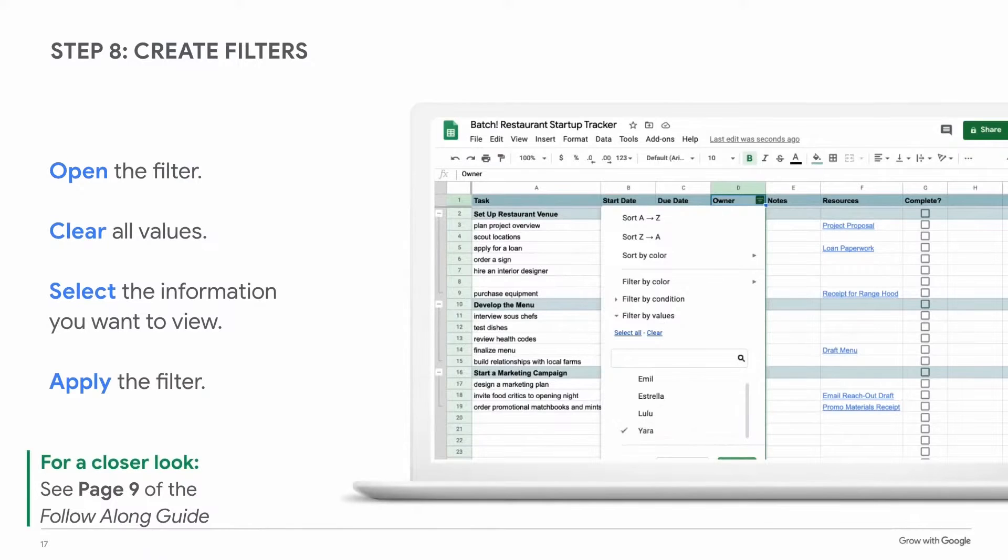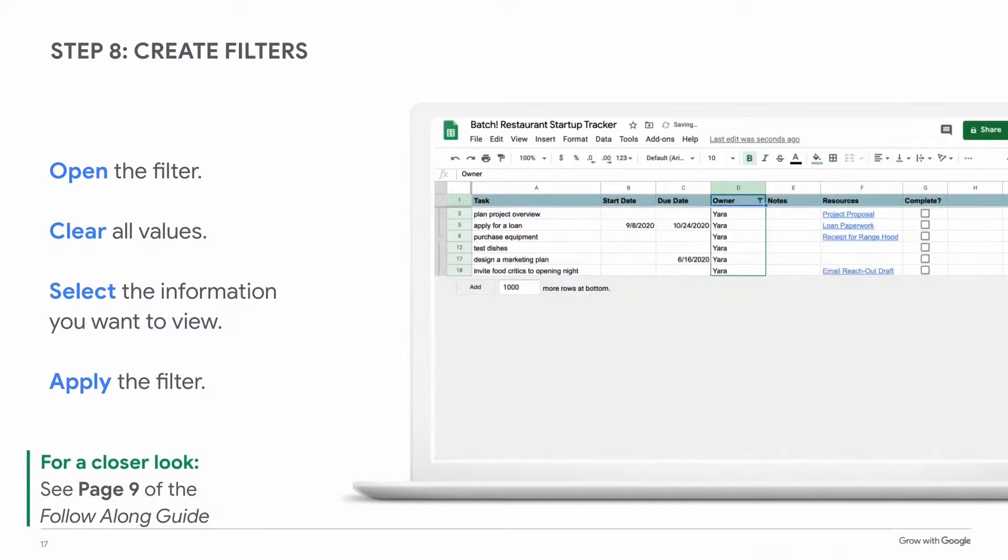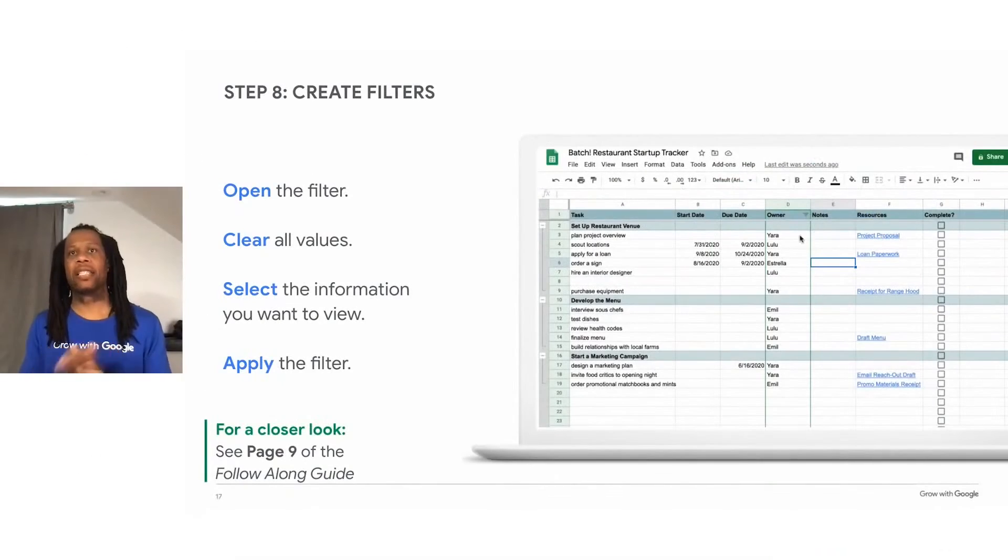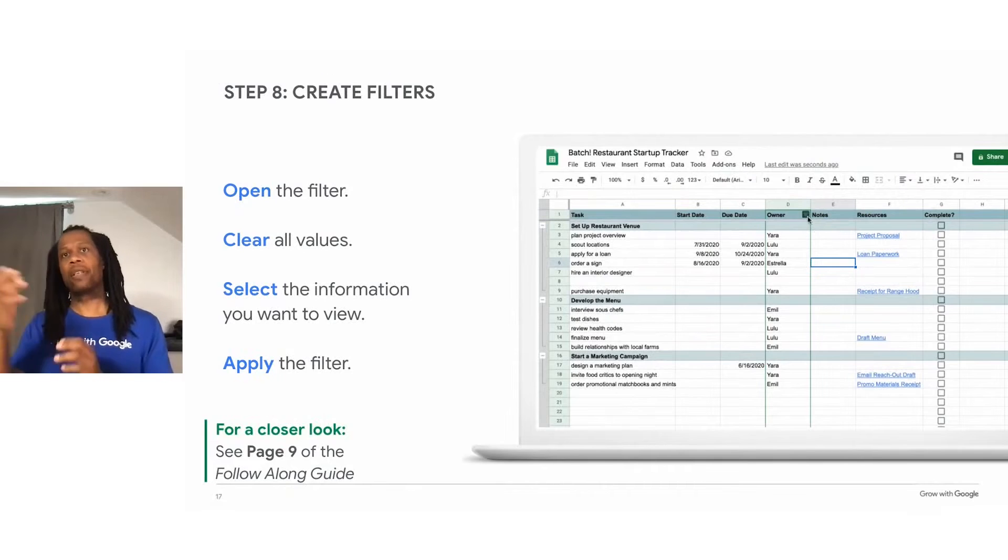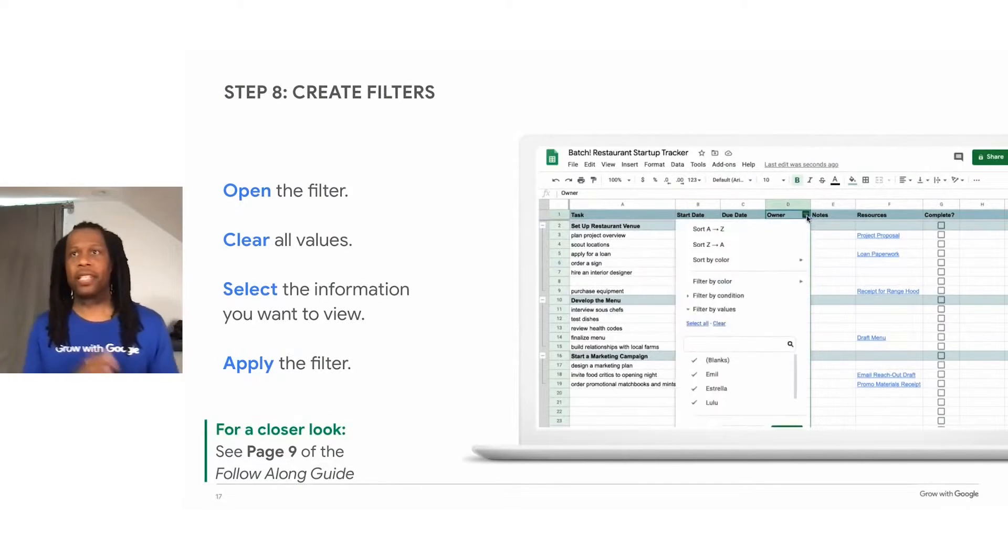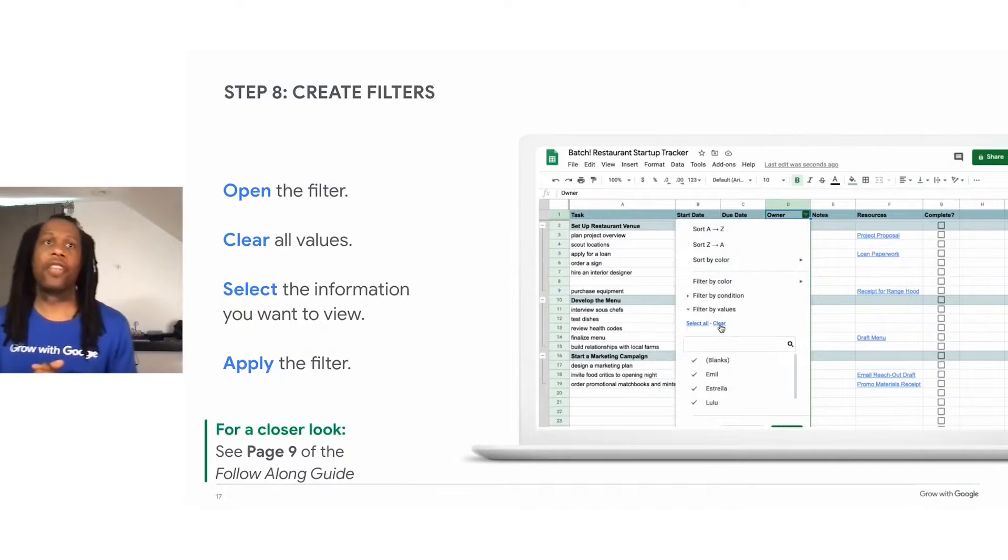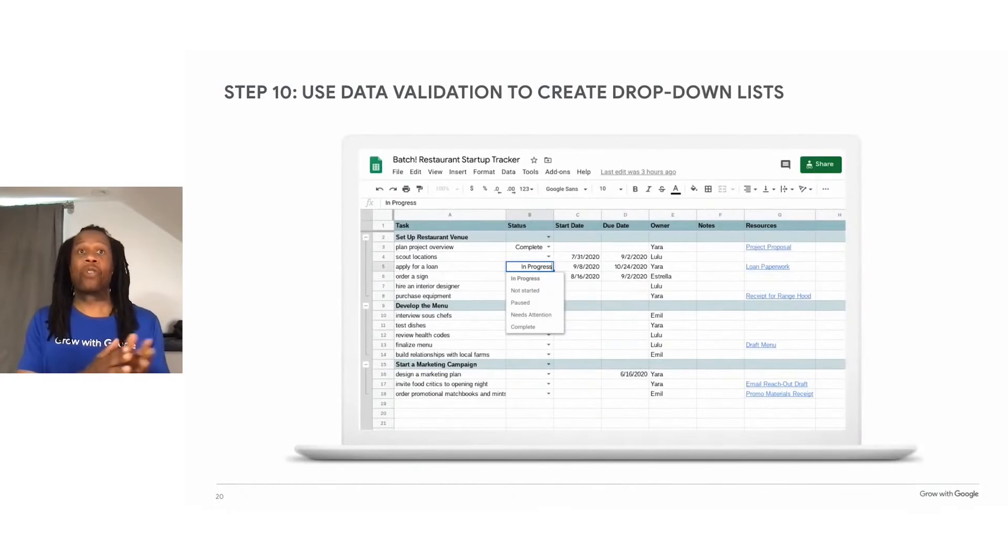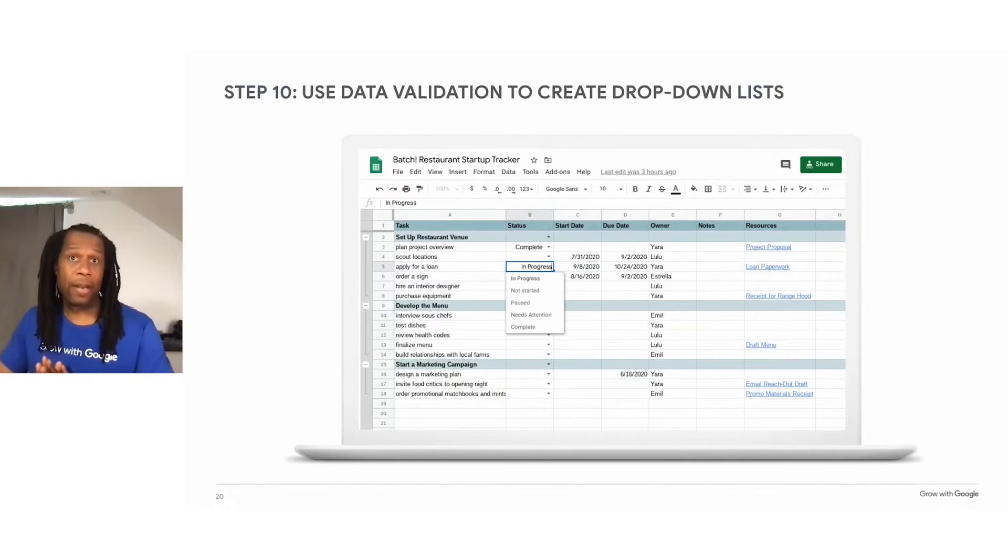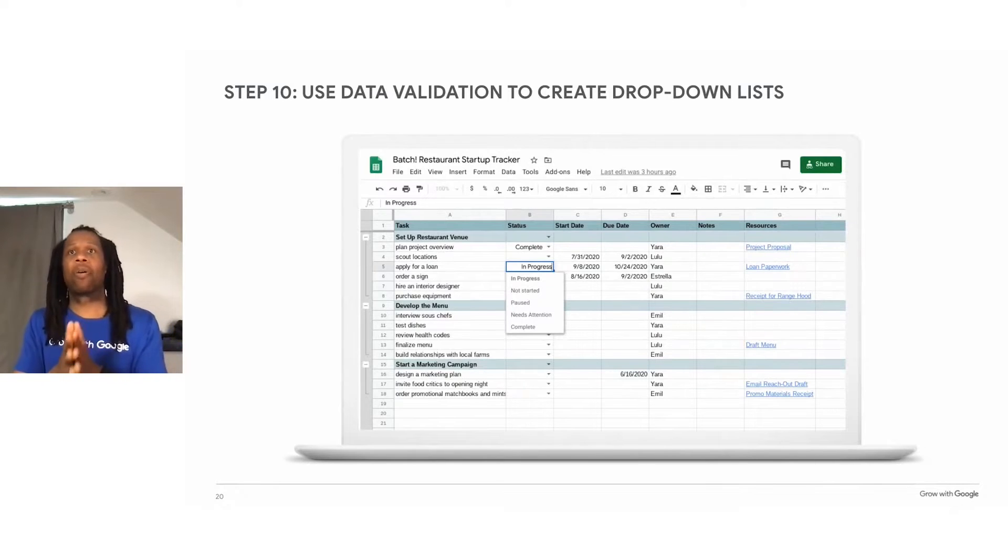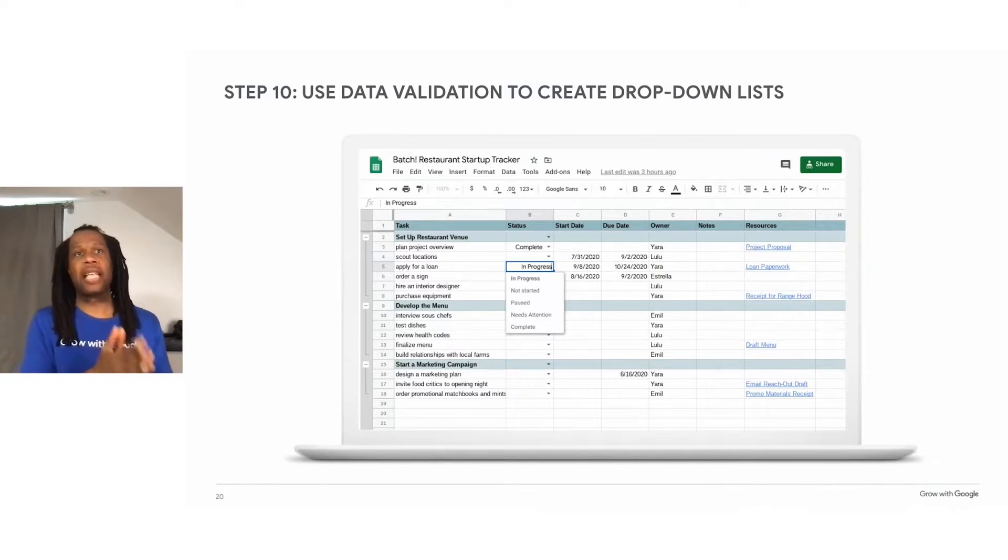The filter temporarily removes tasks that do not meet this condition from your view. The animation on this slide shows a user applying a filter to see only their tasks. The user opens the filter, selects their name, in this case Yara, and filters the spreadsheet. In the sample tracker, we'll create a dropdown menu that allows you to easily select the progress of a task.